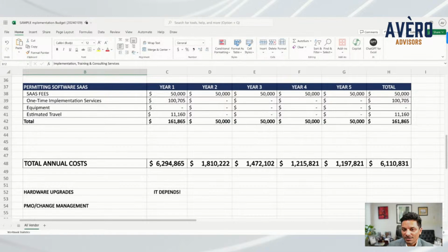If you're going to spend 6 to 10 million on a large ERP implementation, you need the support because your employees have full-time day jobs. The configuration consultants you bring in will have a specific scope to take care of. You need a PMO. You need a third-party independent PMO that does nothing but project manage and make sure that what you bought, what you raised money for, what you stuck your neck out for, is being delivered at the highest quality and up to your standards. So with that, this is a very, very short, skinny version of calculating total cost of ownership.